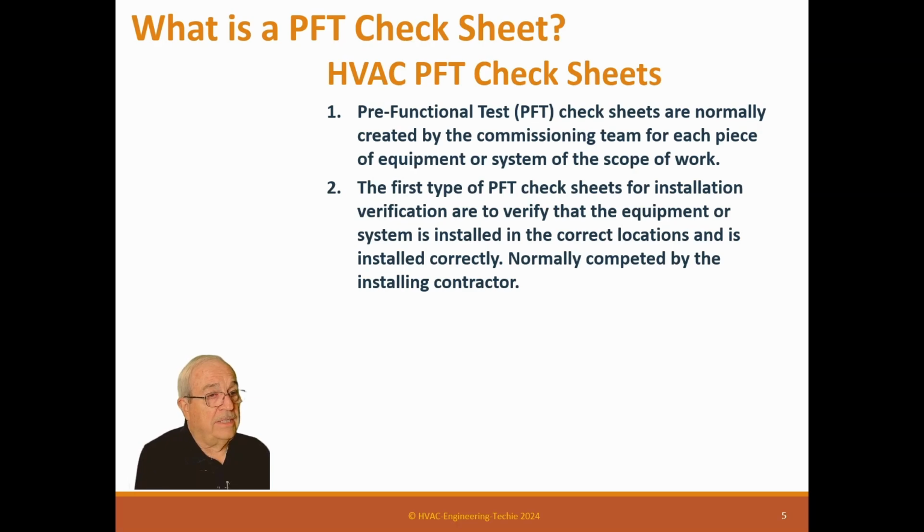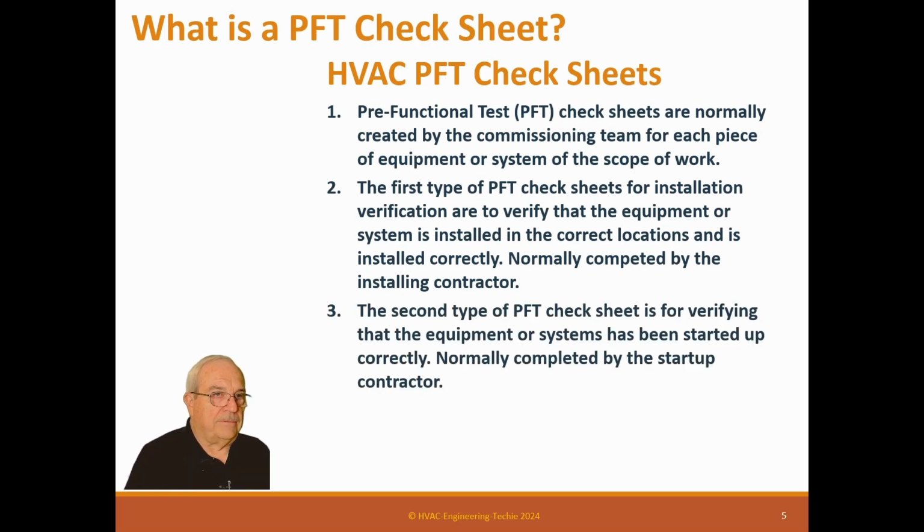So sometimes I'll tell a contractor, if you have a system already in place and you're really used to using it, give it to me and let me look at it. And if they're sufficient, we can use those. 90% of the time I've done that, they're inadequate. They're not adequate at all. They don't collect the right data. They're not intense enough. So we just make it easier. We provide them with everything. It's so much easier to do it that way.